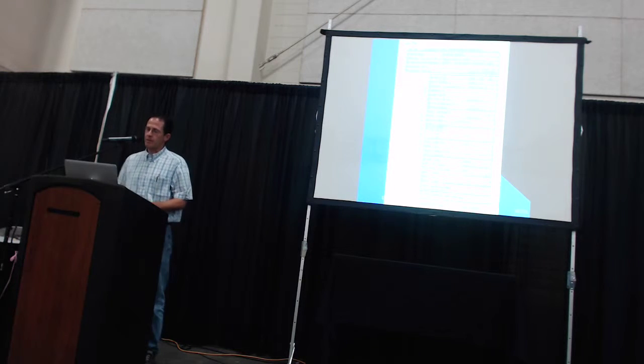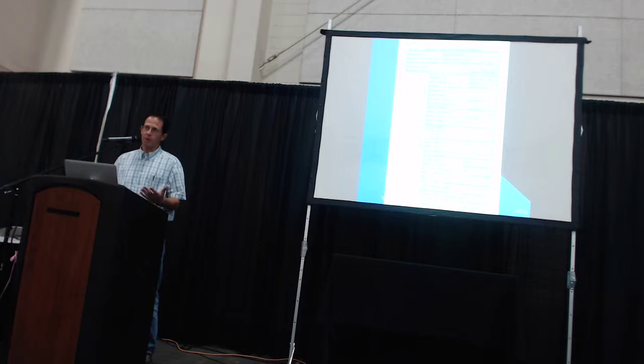And here's an example of that form filled out. That form needs to have all of the information that you see here, things like the ram weight, the rated energy of the hammer, the cushion information, and also the pile information that will be used. All of this information is needed by the designer to run a WEAP analysis.